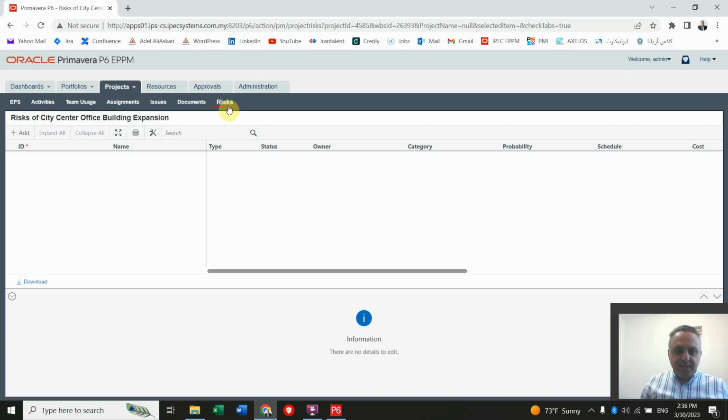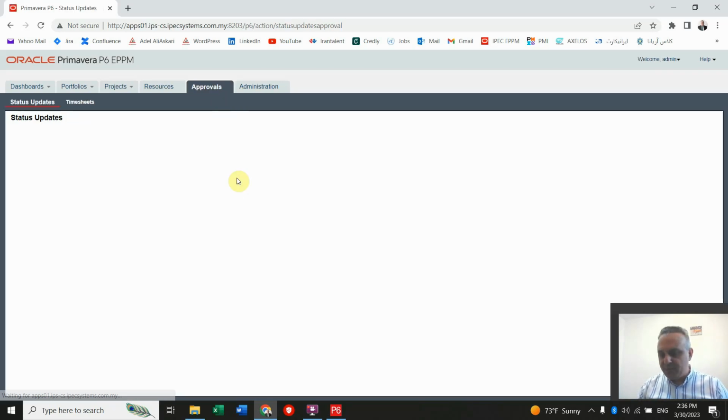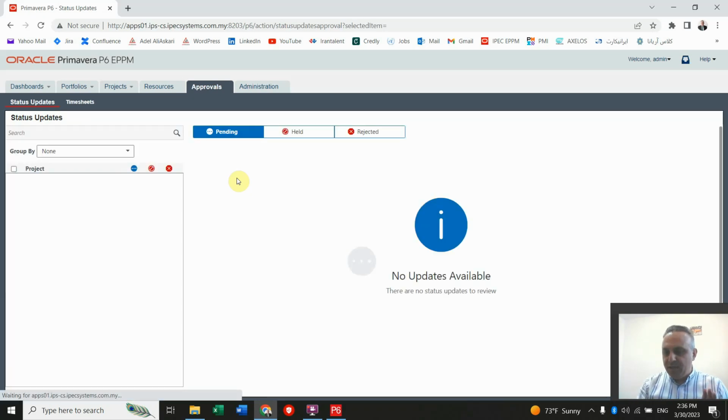The other option that is available here and is not mentioned in P6 is the approval. What it means is that, by approval, you can have the application on the cell phone device of each team member. You can send the activities or their assignments to their application and to their cell phone on a daily or weekly basis, and they can review their assignments and tasks. By starting the activity, they can send the information back to you, and by the level of approval that you set, you can approve their update or they can update the activities automatically.